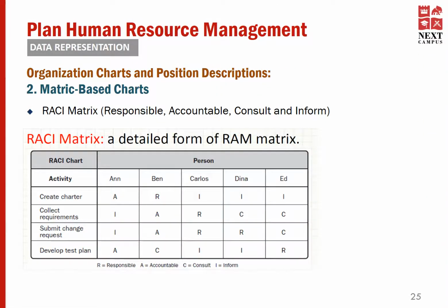This is an example of a RASI matrix, which is a detailed form of the RAM matrix, the responsibility assignment matrix. As you see, for each activity, who is responsible, who is accountable, who is consulted, and who is informed is defined in the matrix.